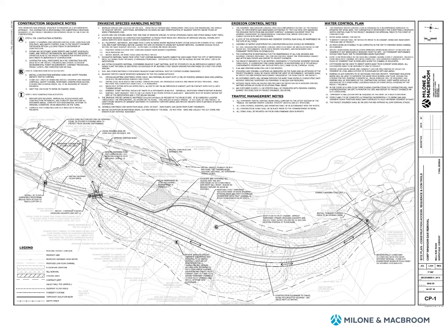Knotweed contaminated soils should be removed first. See the notes on invasive species handling. The dam and sediment removal will need to be incremental to bring one down and then the other, so that the dam will hold back sediment during removals and be part of both the water control and sediment control for the project. Water management is expected to be possible using sediment berms to direct flow away from the active work areas.